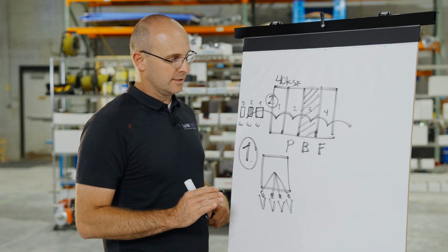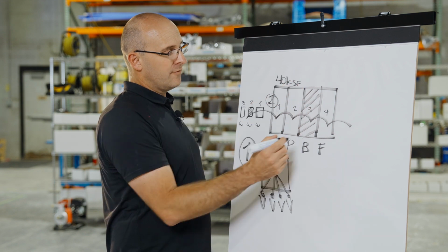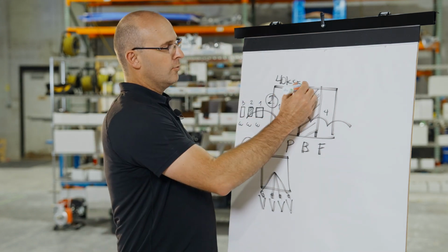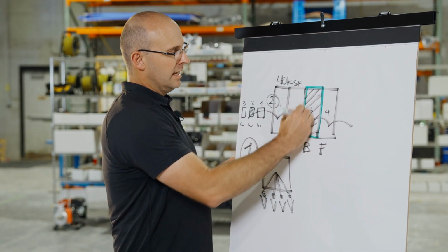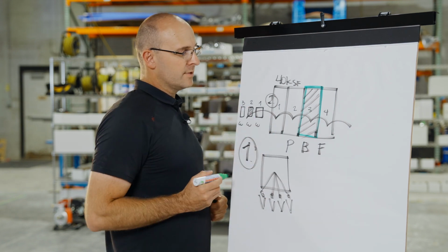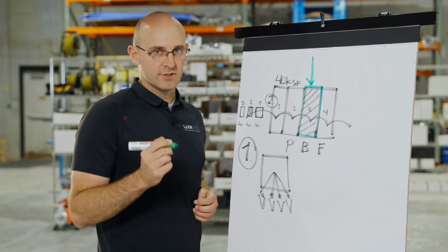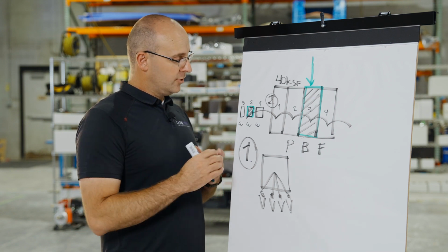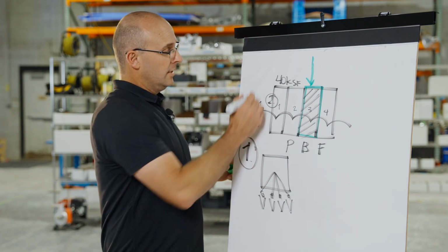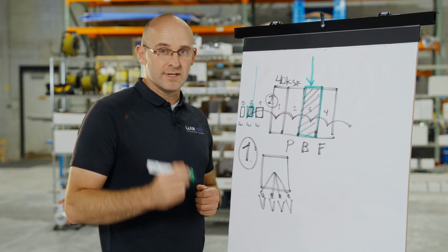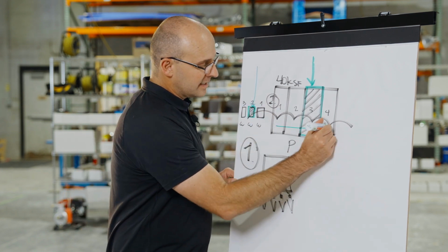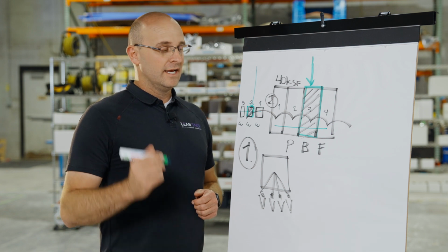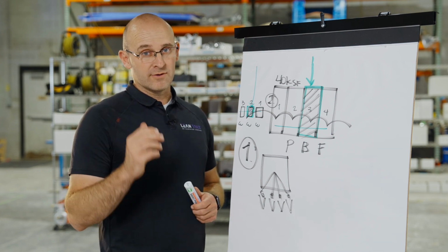Here's how I can explain this a little better. You will never go any faster than your slowest zone. So let's say, for instance, that this right here was your slowest and most complex zone. If you don't make that smaller and more even with the other zones, this will be the pace of your job. Let's say that contractor number 2, this crew, you, take longer, and you should really split up into 2 crews, but you didn't. Your project will never go faster than that slowest crew. So leveling these to have a similar amount of work, leveling these to where they have a similar amount of value they're adding is crucial to flow. And that's concept number 4 and 5.